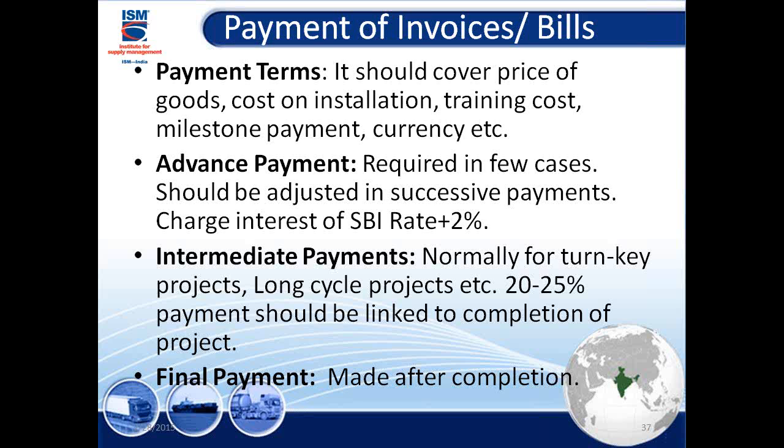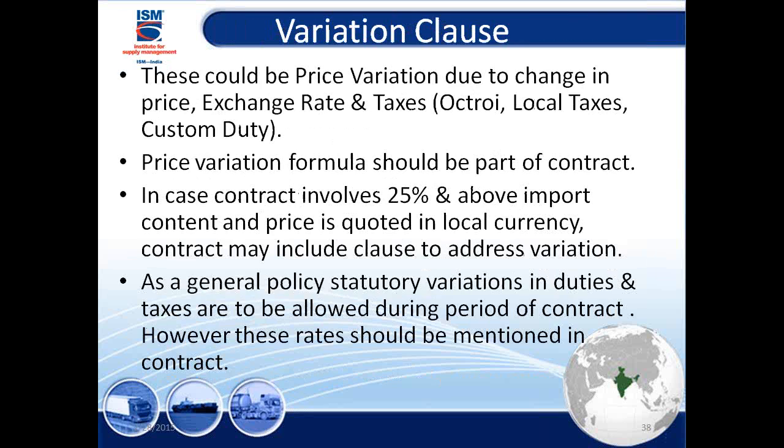So this is how it is there. If the State Bank of India lending rate is 10%, they will charge you 10 plus 2, 12% for the advance they have paid you. In short, they're giving you a loan actually. And that advance payment has to be adjusted later on with each payment, with final payments made after completion.